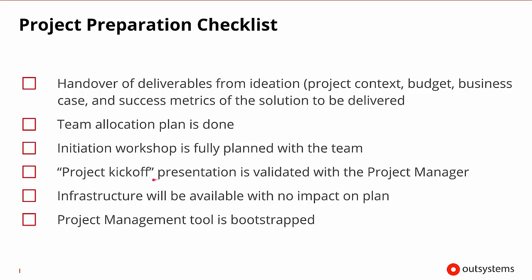We should be reviewing the project kickoff presentation and make sure that it gets validated with the project manager. And we want to make sure that things are verified as far as the infrastructure so that it will be ready and available when the project starts. And if we're using some sort of project management tool, it would be good for it to be bootstrapped with all of the relevant data. So guaranteeing the continuity and alignment between the ideation phase and the delivery phase is very important. So the initiation workshop is here to help facilitate all of that work.